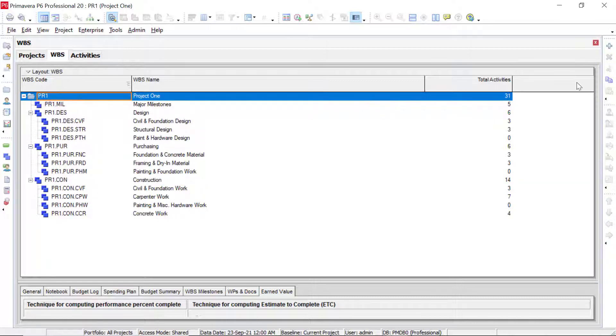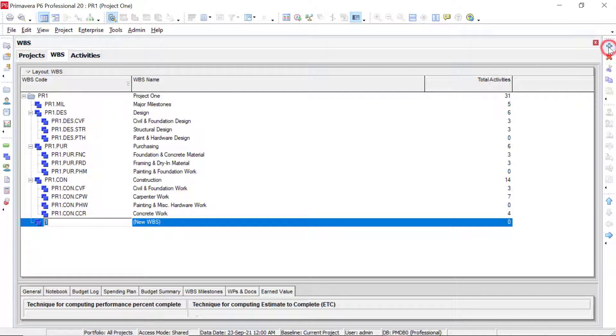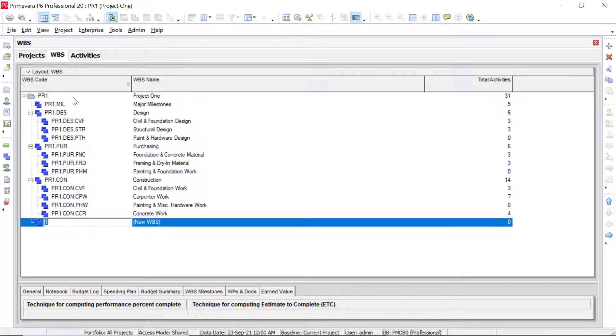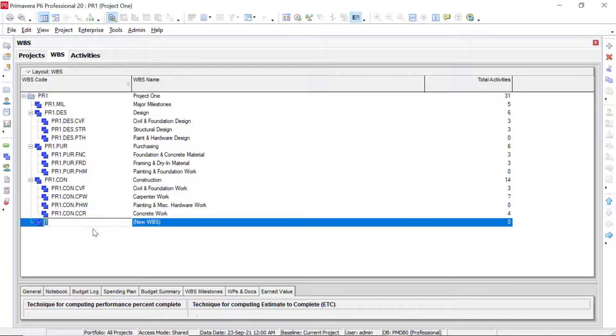We can click the add button. And so we see when we look at the level that it's at, it's been added in as a second level WBS element, because we were highlighted on this project up here, which is our first level. So for this one, it's going to be engineering. So we're going to do ENG for our code, we can press enter. And then we can tab over and type in engineering.